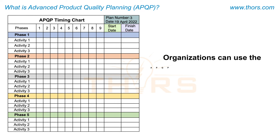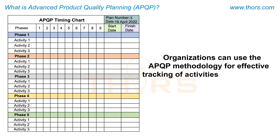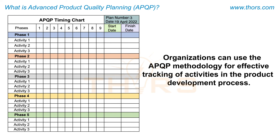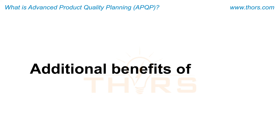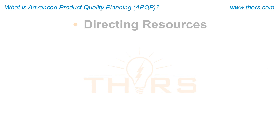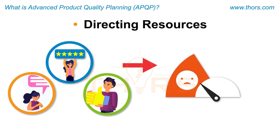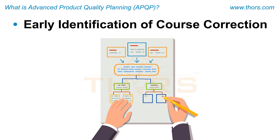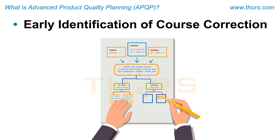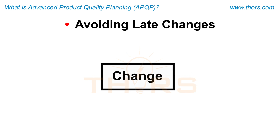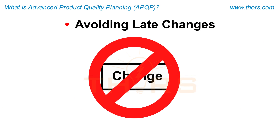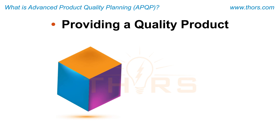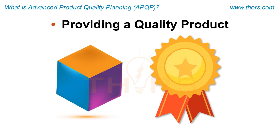Organizations can use the APQP methodology for effective tracking of activities in the product development process. Additional benefits of APQP include directing resources to satisfy the customer, promoting early identification of the required course corrections, avoiding late changes which are invariably expensive, and providing a quality product on time at the lowest cost.